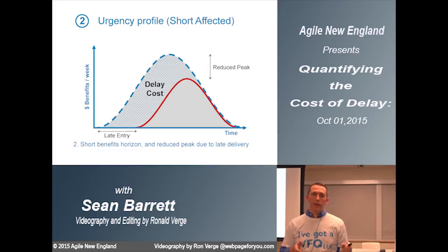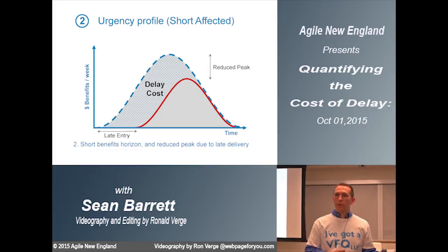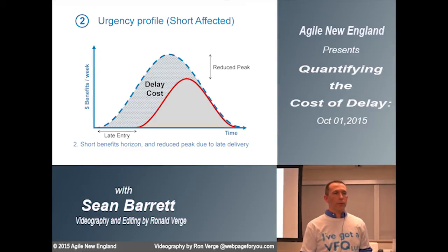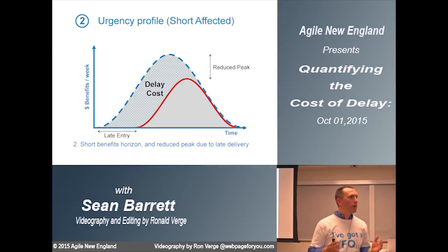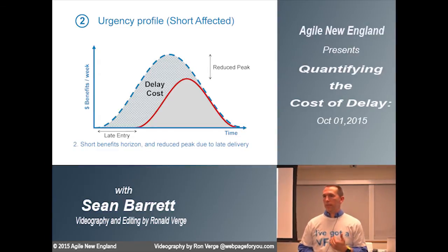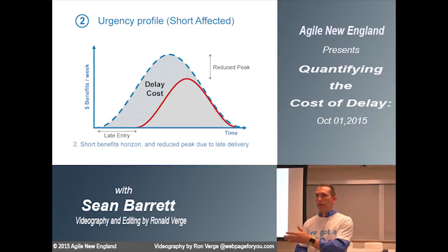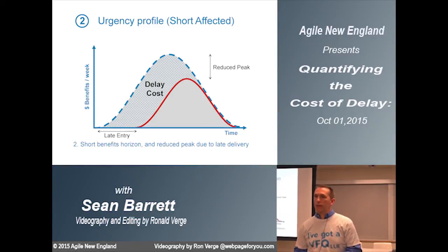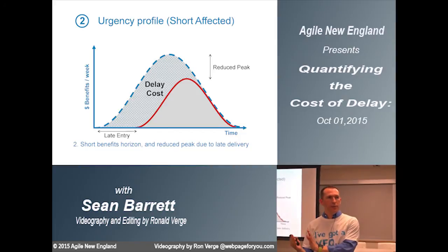And so if we miss the opening of the season, either in preparation of our products or in preparation of our marketing, we can actually miss out on a lot of the value that's in that very short window. And because people have a time limit for themselves, they may go to a competitor, and that creates the reduction in the peak. It's not like if we wait and we get it all in the last 2 weeks, all those customers are still going to be available.